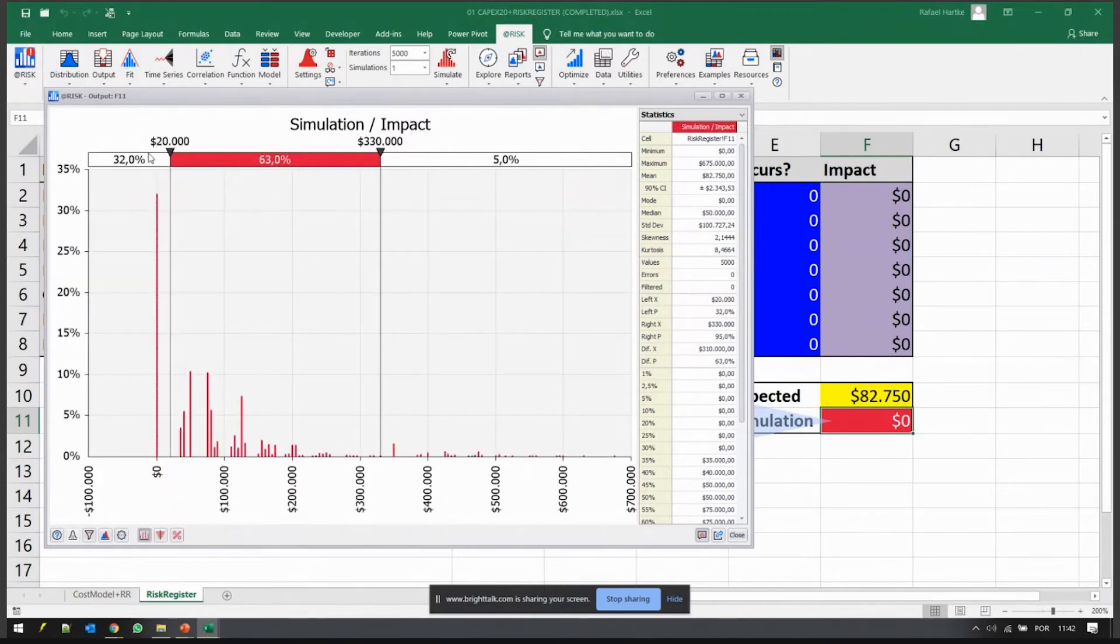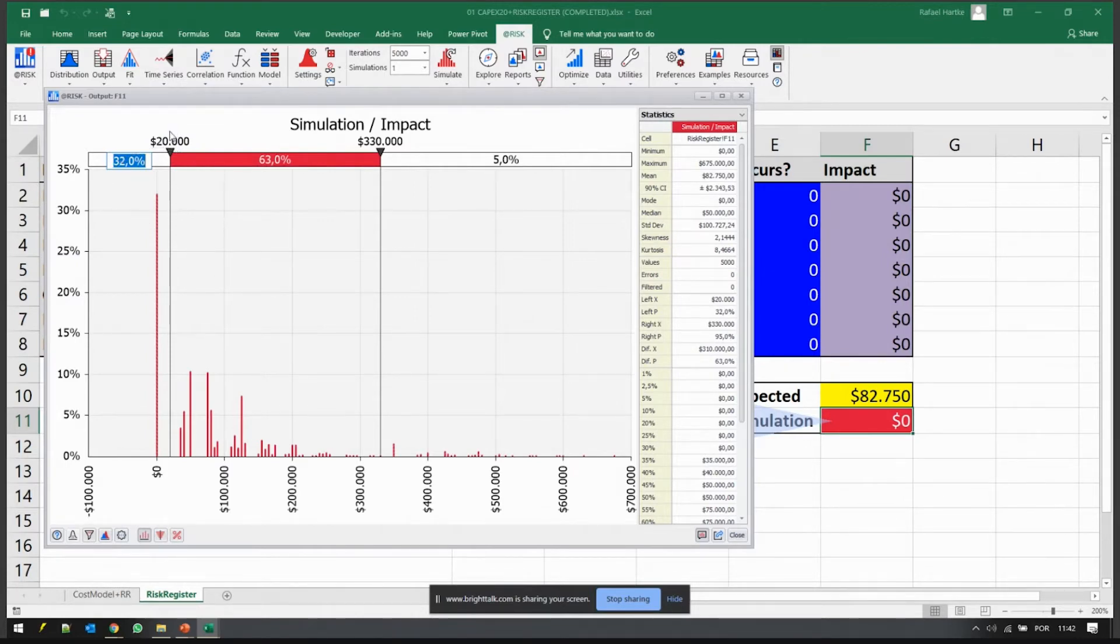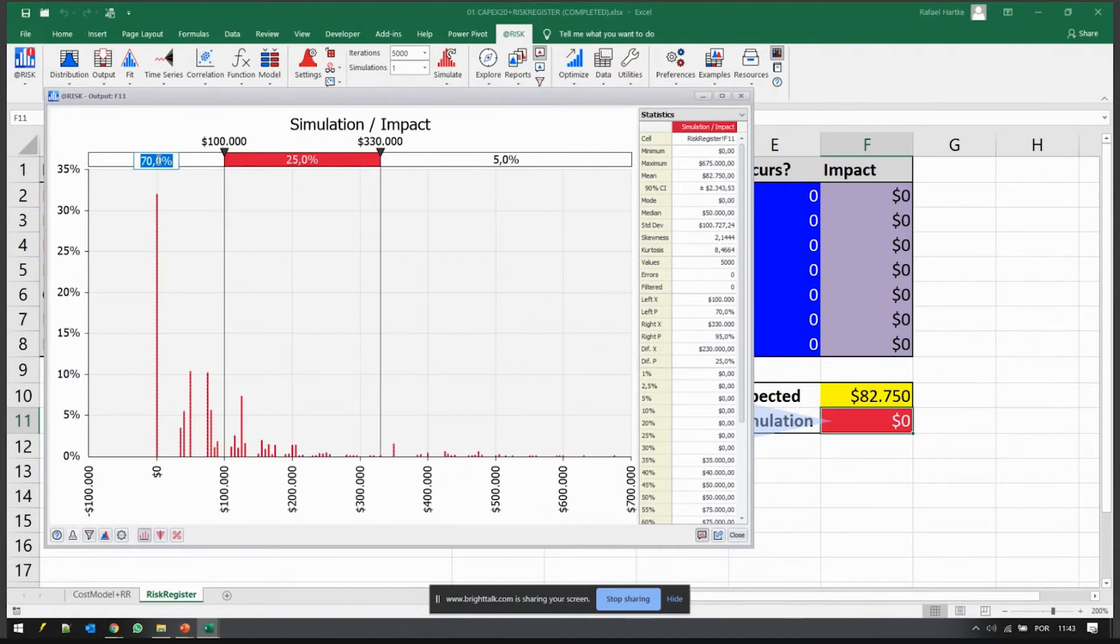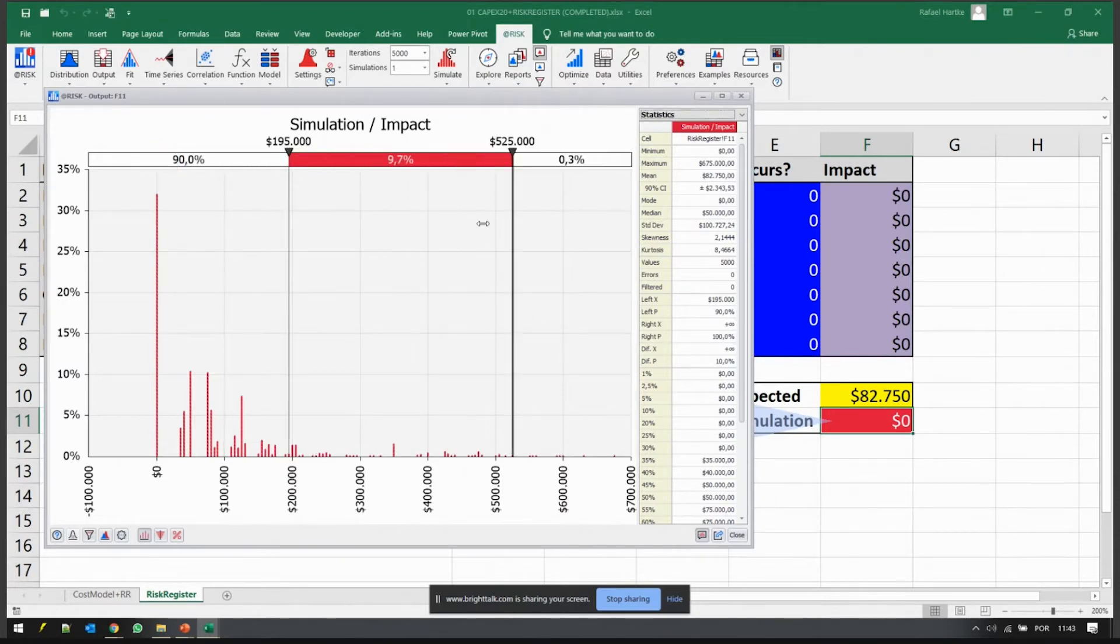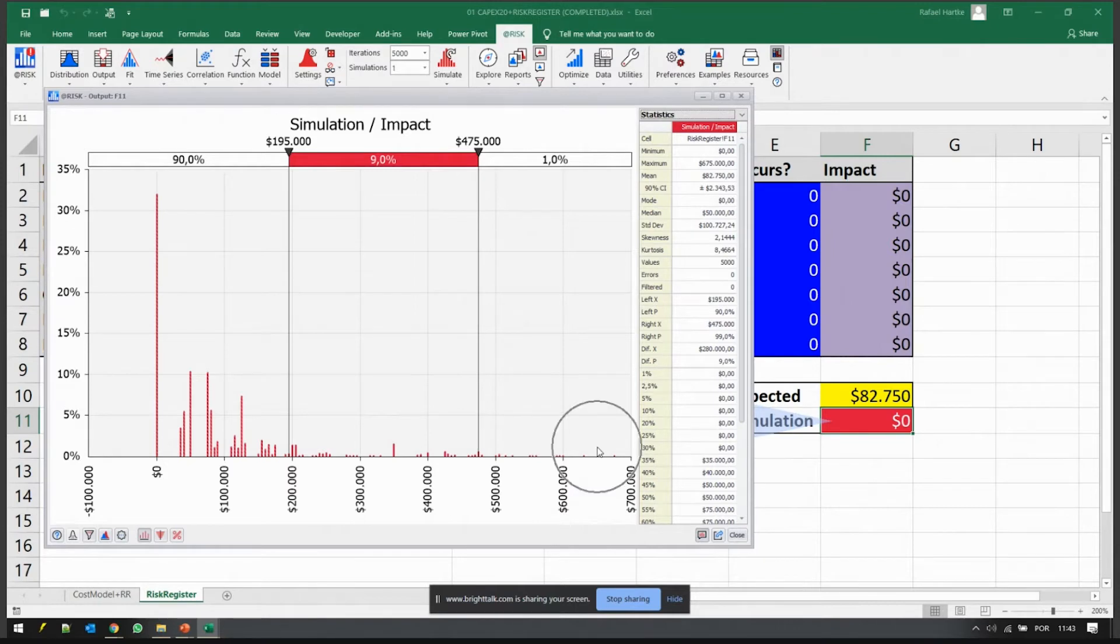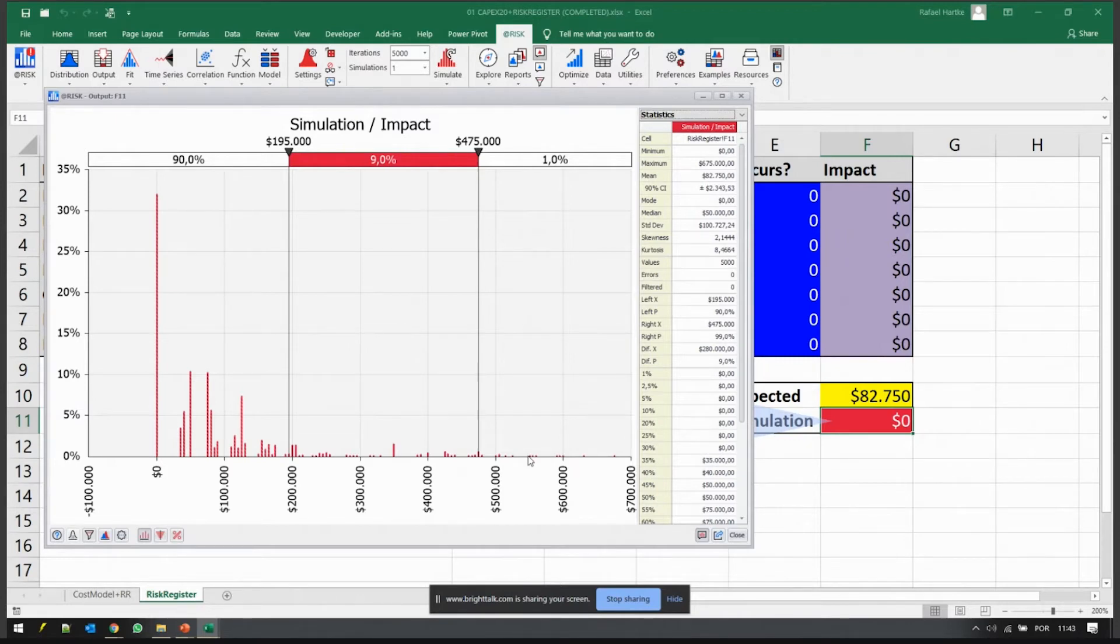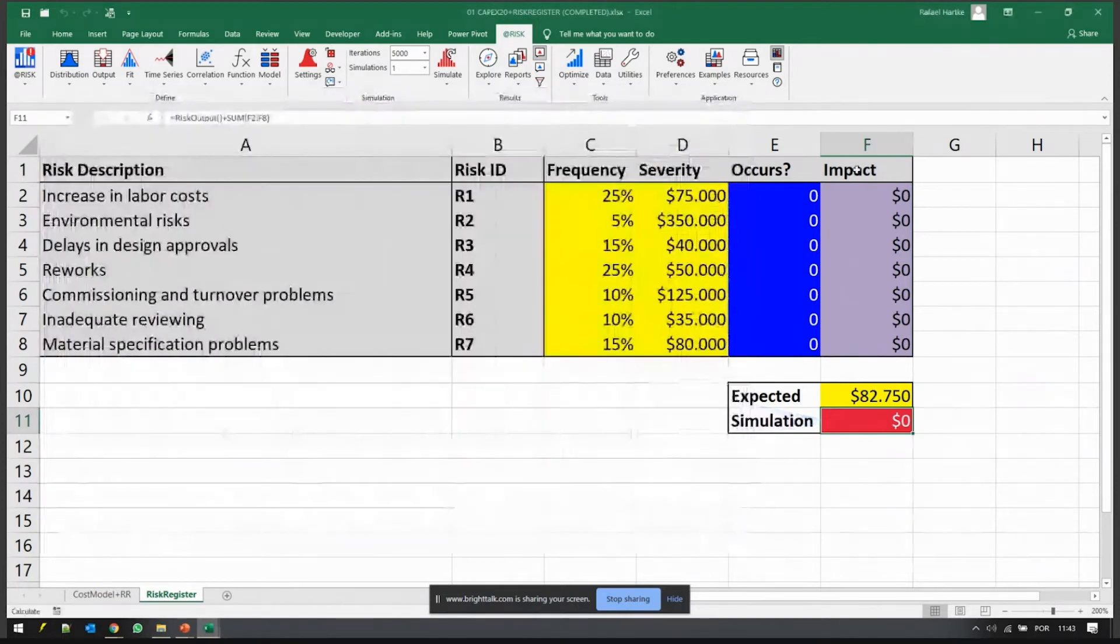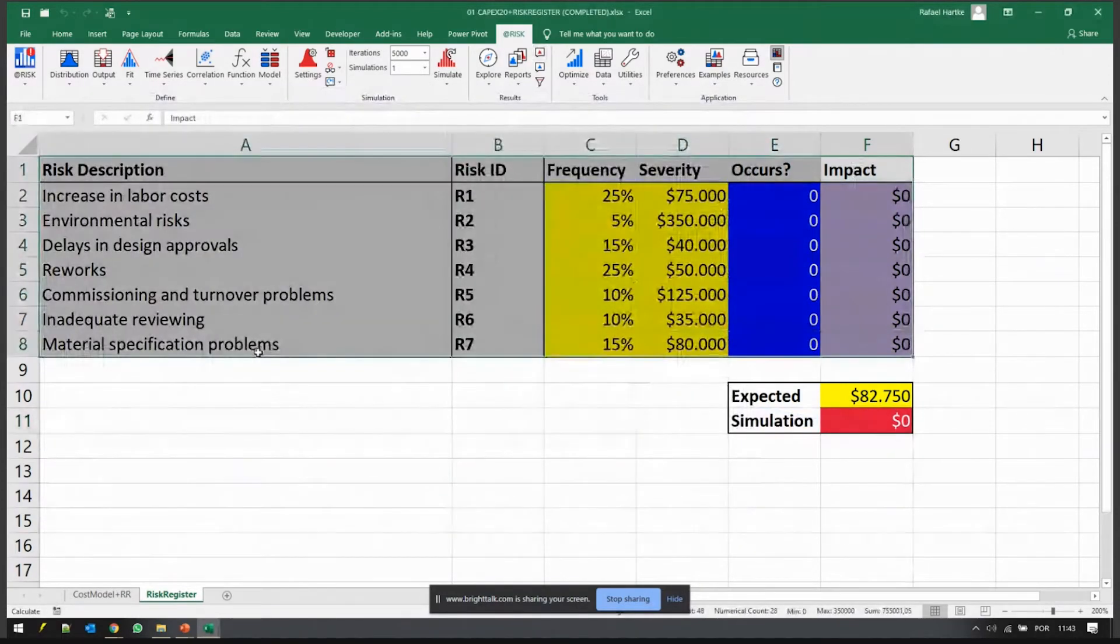There's a 32% chance that no risk will occur. There's a chance that this risk will cost less than $100,000. There's a 70% chance that it will cost $100K or less, which is good. There's a 90% chance that it will cost $195K or less. There's even a 1% chance it will cost more than $475K, almost $600K-$700K - they might add a lot to your costs. But the likelihood of these extreme costs is very small. Most of the time you'll be around an extra cost of $100K, maybe $150K, maybe $50K, less than $200K.